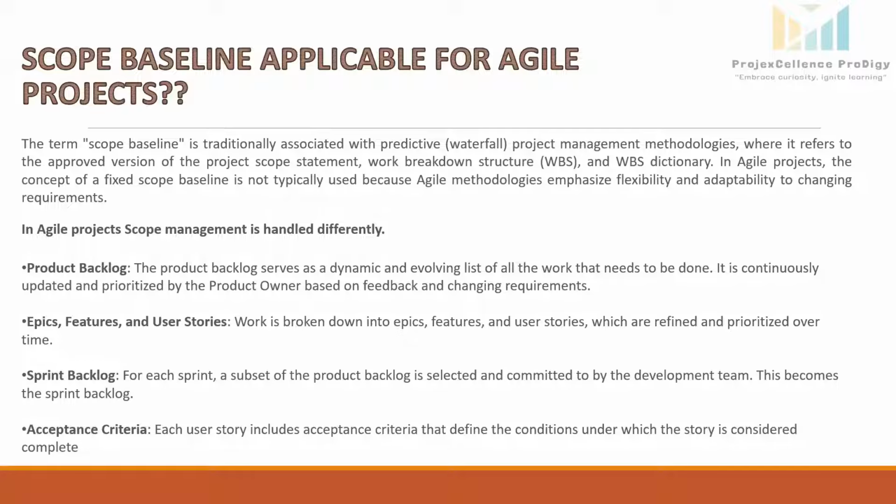Each user story is written from the perspective of the user and typically follows the format: as a, I want, so that. These are refined and prioritized over time, allowing teams to tackle the most important work first.